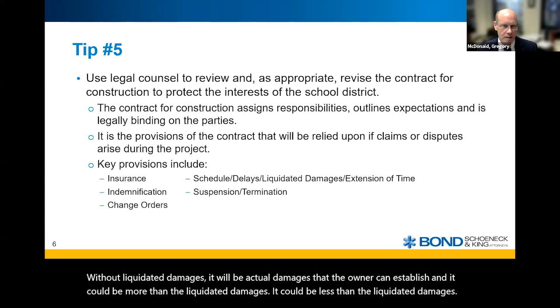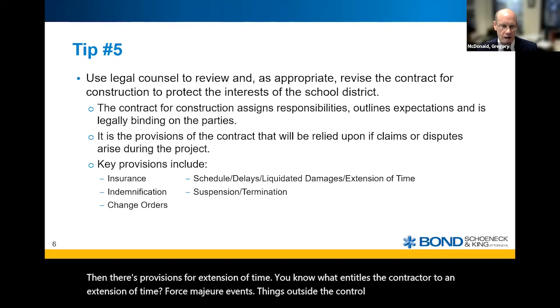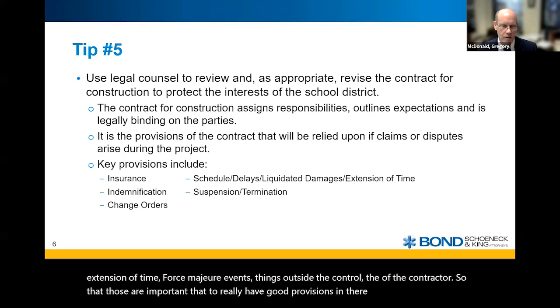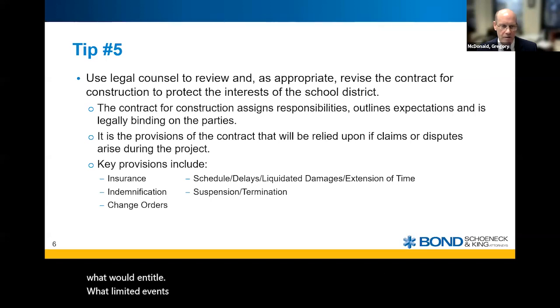Then there are provisions for extension of time. What entitles the contractor to an extension of time? Force majeure events, things outside the control of the contractor. So it's important to have good provisions in there, so that everybody knows what limited events entitle the contractor to an extension of time.